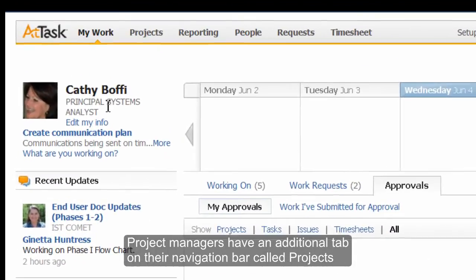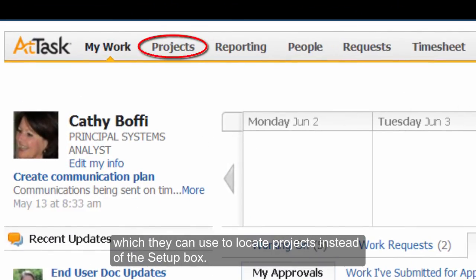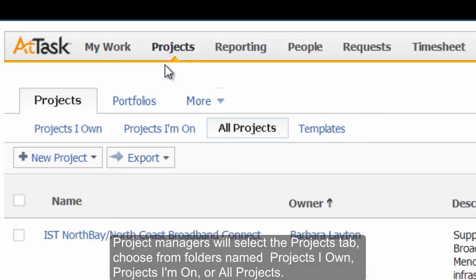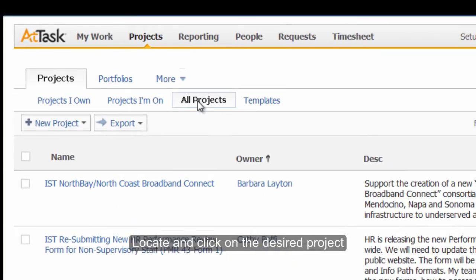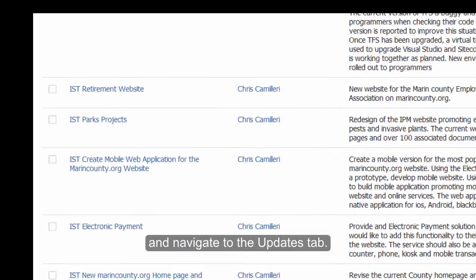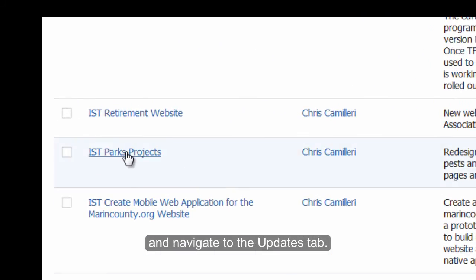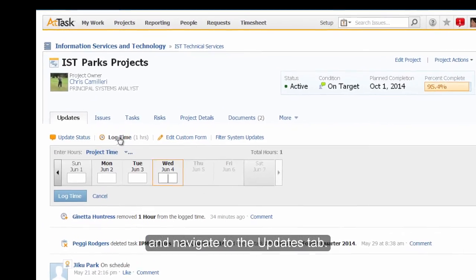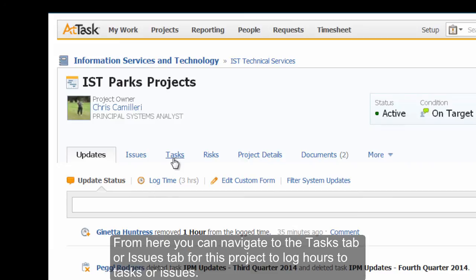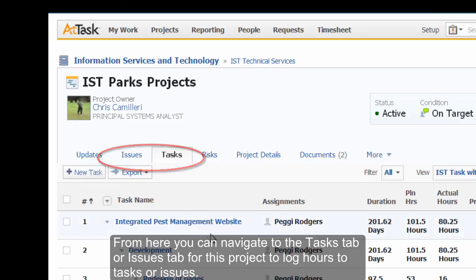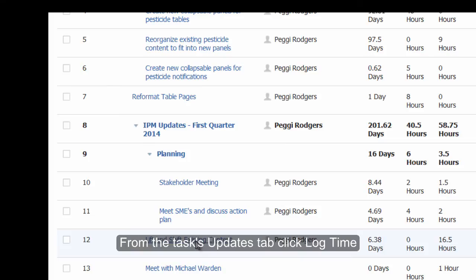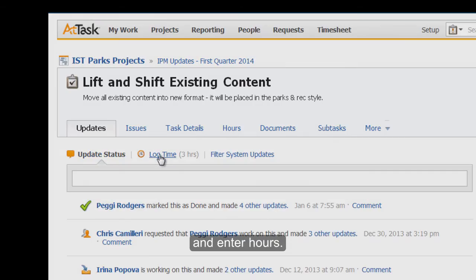Project Managers have an additional tab on their navigation bar called Projects, which they can use to locate projects instead of the Setup box. Project Managers will select the Projects tab and choose from folders named Projects I own, Projects I'm on, or All Projects. Locate and click on the desired project and navigate to the Updates tab. Select Log Time to enter hours. From here you can navigate to the Tasks tab or Issues tab for this project to log hours to tasks or issues. I'll go to Tasks, select a task, navigate to the task's Updates tab, click Log Time, and enter hours. This process is the same for logging time on issues.